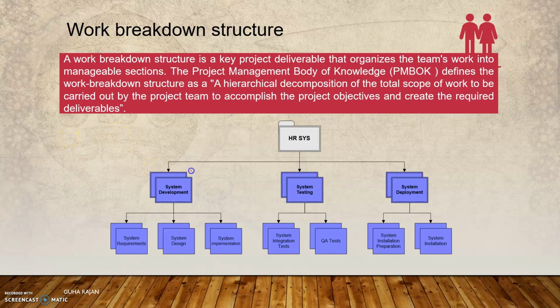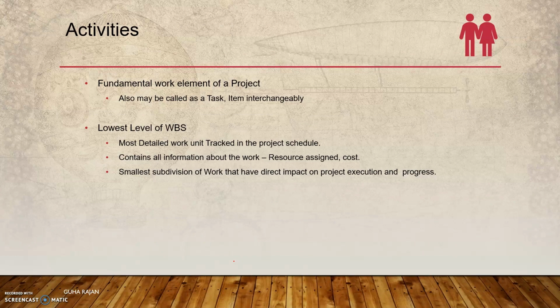If you look at it, the top is the WBS top, and you can even consider HRSys as the WBS, and underneath you have the other WBS, and the last level is the activities: requirement analysis, system design, system implementation, and so on. Based on these activities, you build up the relationship. Activities are the fundamental work elements of a project, and sometimes they are referred to as tasks. Both relate to the same thing. It is the lowest level of the WBS, the most dedicated work unit tracked in the project schedule.